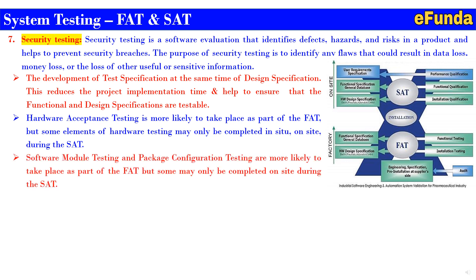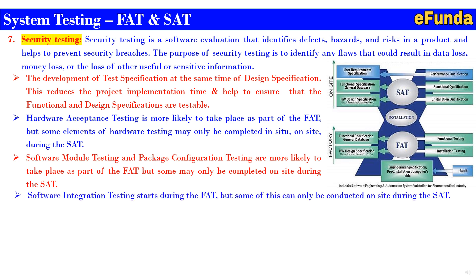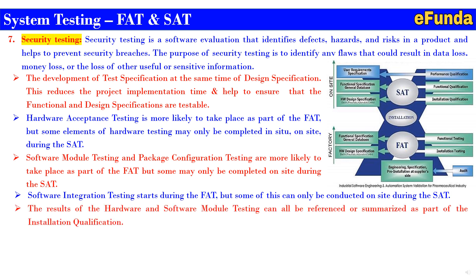Software module testing and package configuration testing are more likely to take place as part of the FAT, but some may only be completed on-site during the SAT. Software integration testing can be completed on-site during SAT — it starts during FAT but some tests can only be conducted on-site during SAT. The results of hardware testing can all be referenced or summarized as part of the installation qualification.